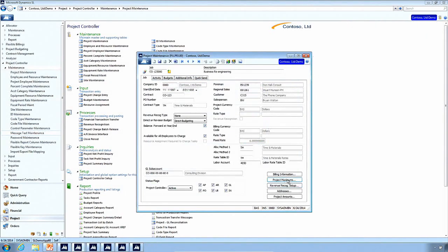It can be tricky in the fact that it's always the first in that gets to count. And so if I come into the project towards the end and my 5 hours cause it to be over, mine are automatically going to be the ones that are adjusted. It's not going to adjust by a certain person. It's always going to be the last set of hours that are generated.